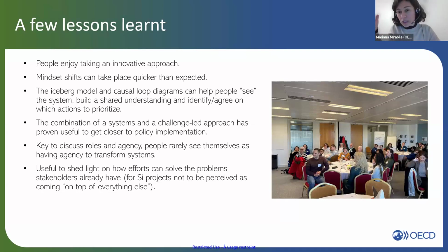It has been difficult in our experience to fund systems innovation projects, and in particular to fund the coordination roles that are needed for the implementation of these policies, the connectors role. And due to these funding limitations, linking the project as much as possible to what people are already doing is fundamental, because these projects often, at least in our experience, tend to come on top of everything else, and that everything else tends to be a very full plate for government officials.